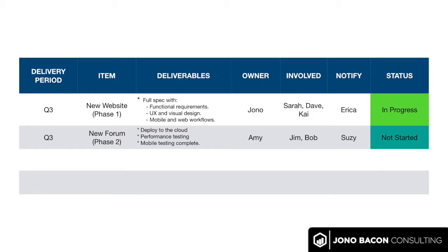Now, the other thing that you want to put in for each of those items as well is who is the owner. So the owner is not necessarily who is responsible for doing all the work. It's who is responsible for the project getting done.